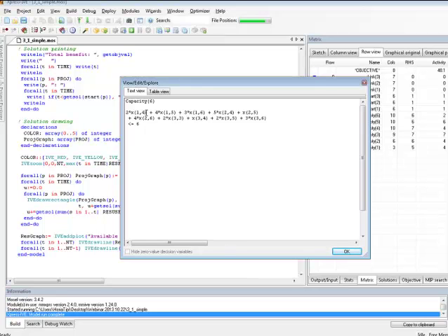So if we engage in project 1 during time period 4, we will incur capacity cost of 2. In other words, we're going to use 2 resources. If we engage in project 1 during month 5, we're going to incur resource cost of 4, and so on and so forth. And so we want to make sure that this is below our resource limit.